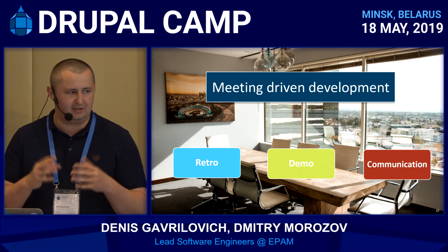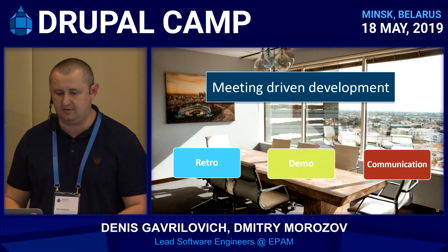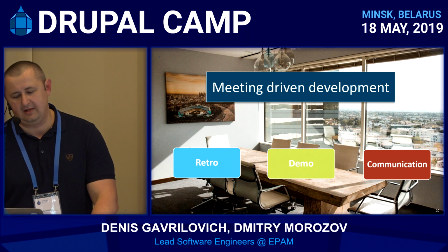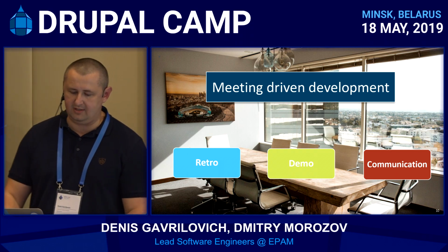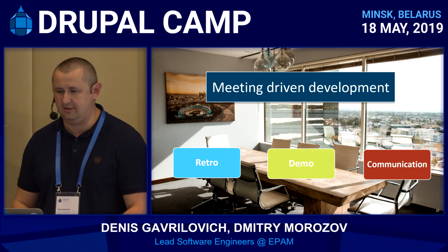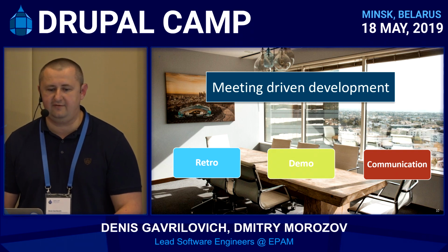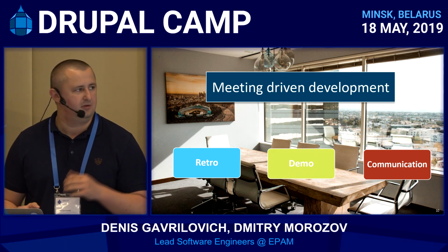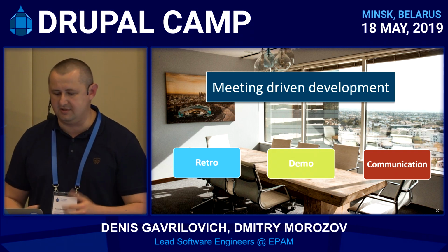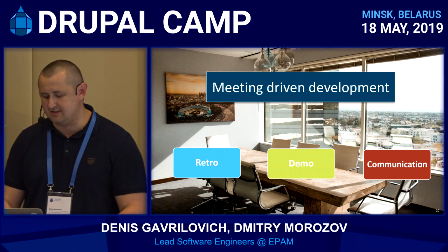You just don't understand what the feature is about, and we decided that, okay, let's do it probably once per 2 months, but show only completed features and prepare in advance. Do a presentation and prepare a final business feature, just to bring business value.